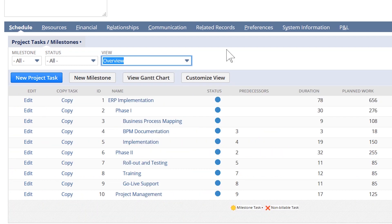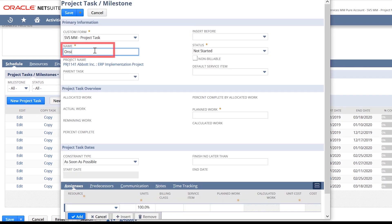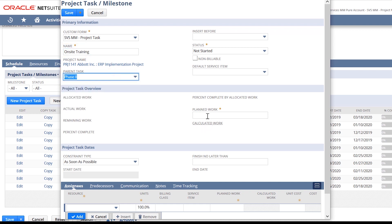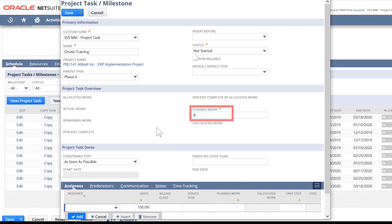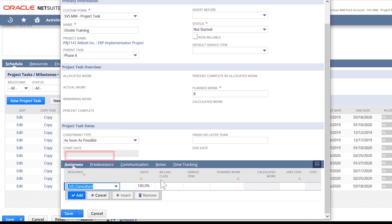While this project template includes the majority of our tasks needed, we have identified that this client requested one day of onsite training after GoLive. For this, I will go ahead and add a new task. I will enter a name for my task and put this as a predecessor task to phase two. We plan to be onsite for one day, so I will put planned work as eight hours and choose the generic resources we need for this onsite.